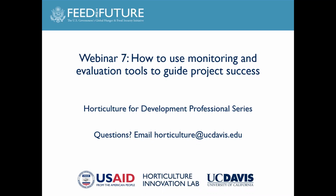So that obviously can also help to facilitate a baseline a little bit easier. Those that require a heavier lift of a primary data collection effort, I think, are usually the ones that are a little bit harder to get right off the bat. I don't have a quick solution other than I think it's best to think through what a baseline is going to look like during the proposal phase. So if you are the implementer and looking at, okay, well, I know that these are the indicators, or I think these are going to be the indicators that we're going to need to report on, but the baseline doesn't exist, having the appropriate resources allocated for a robust baseline effort is really the best tool you can give yourself.